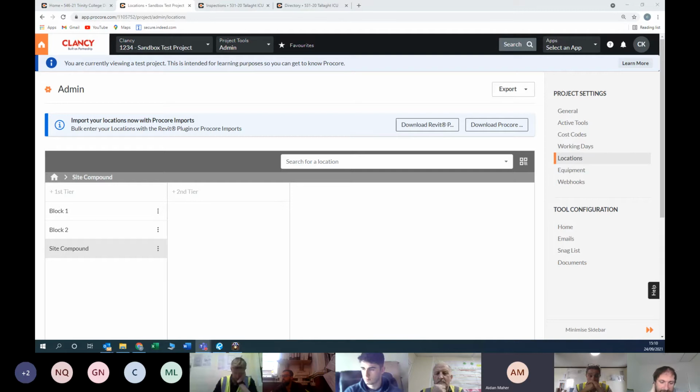Even on a project that we're on, we're using the QR code. We've actually given it to the door manufacturers. So we're using Carl Joinery for the doors. When they have the door manufactured with all the ironmongery that we're adding, we're getting them to add the QR code in the factory. They take a photo of it showing that all the ironmongery is on, and that's their part of the bargain done. And that QR code is on the door when it comes to site, and the carpenter fits it. Then he's using that same QR code to finish off the checklist, which is something not a lot of joinery manufacturers would do for us, but they're doing it for us on the project we're on.